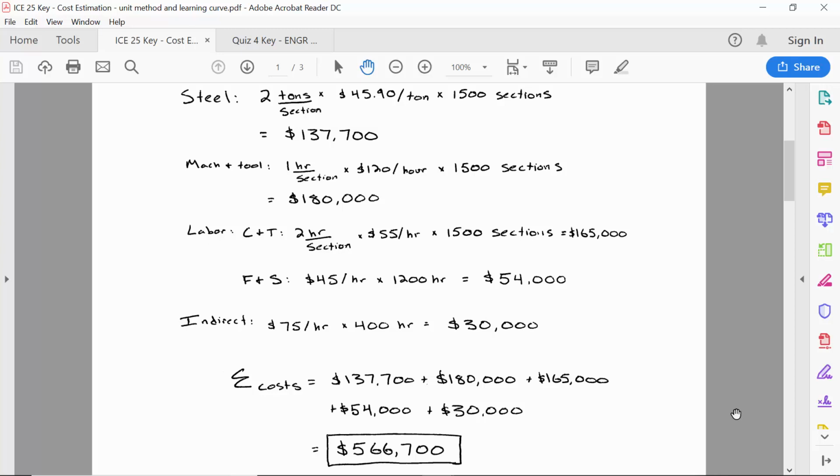And that's most likely to be an efficient estimate, because the one who doesn't bother to figure out all of the different components has to put in a pretty big safety factor to make sure that it doesn't end up being more expensive than they counted on. So here, if you have a good unit cost estimate, then it'll allow you to bid on a project with confidence that you can cover all of the costs and make a desired amount of profit as well.